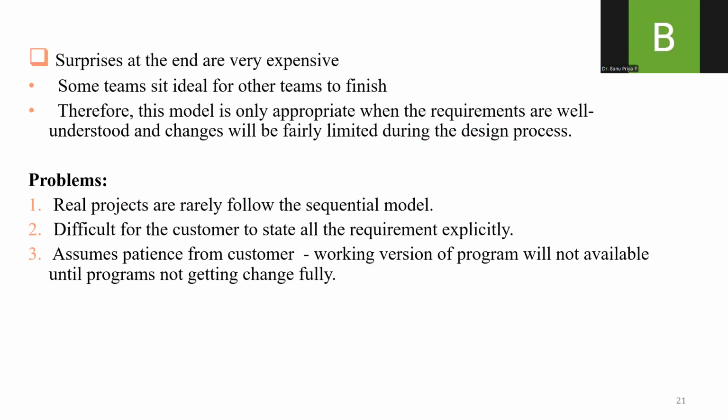Another thing is the final steps. That is, once every step is completed, only then can we move to the next step. But this will always be expensive. And if the customer comes and asks you to change or add some more features, again, this will not happen in the conventional model, which is not appropriate when the requirements can change here and there. That is why real time projects are rarely followed by such sequential or waterfall or conventional software development lifecycle models.